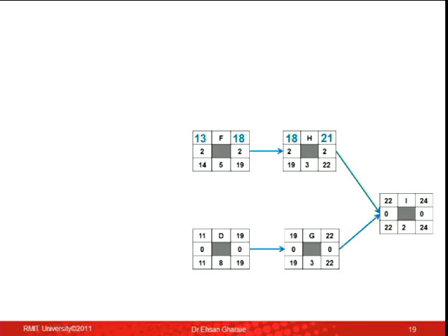When I delayed activity F, was there any consequence in the project? I'm not talking about the end of the project. There were some consequences. Activity F was delayed, and as a result, H was delayed. Agree? But the finish point of the whole project remained the same. So I had some flexibility in terms of not impacting the whole project. This kind of flexibility is called total float.